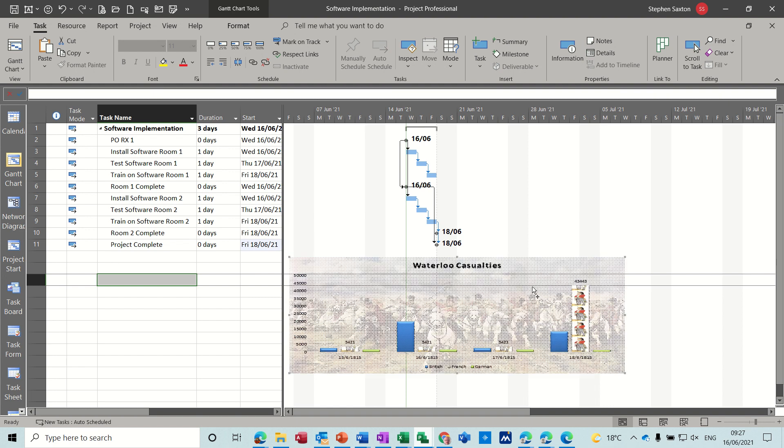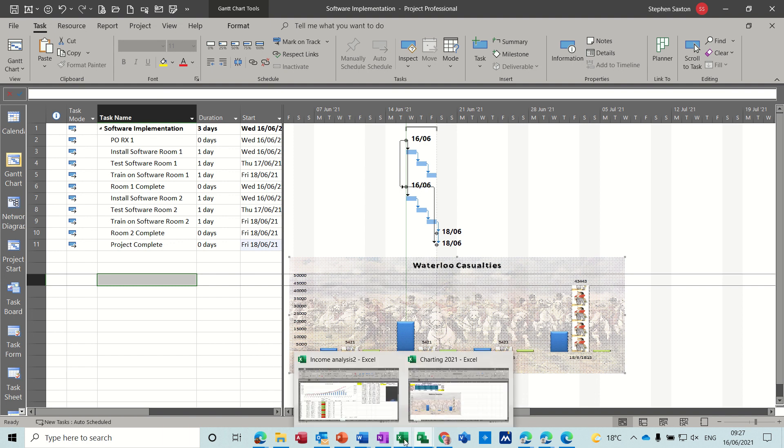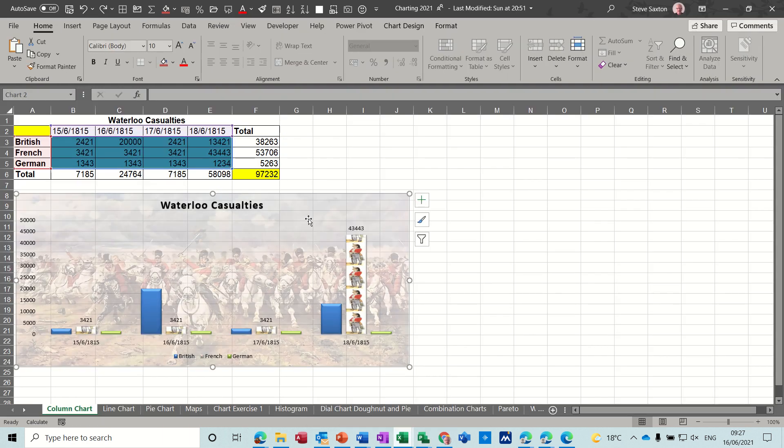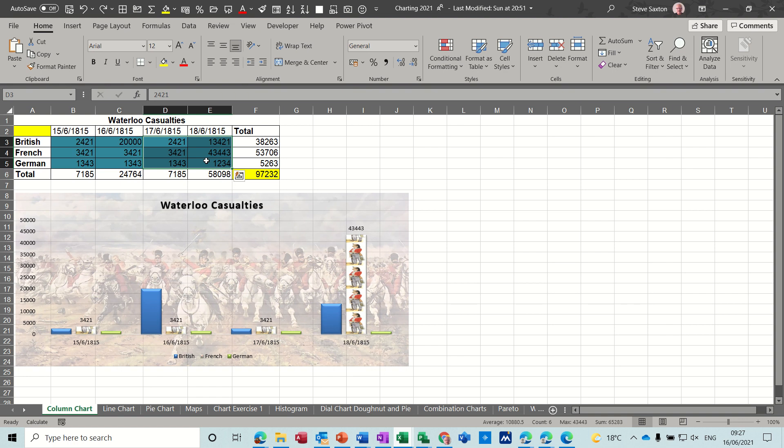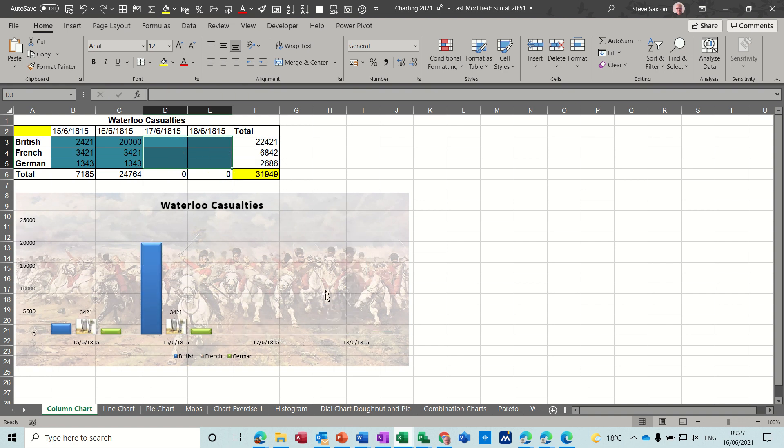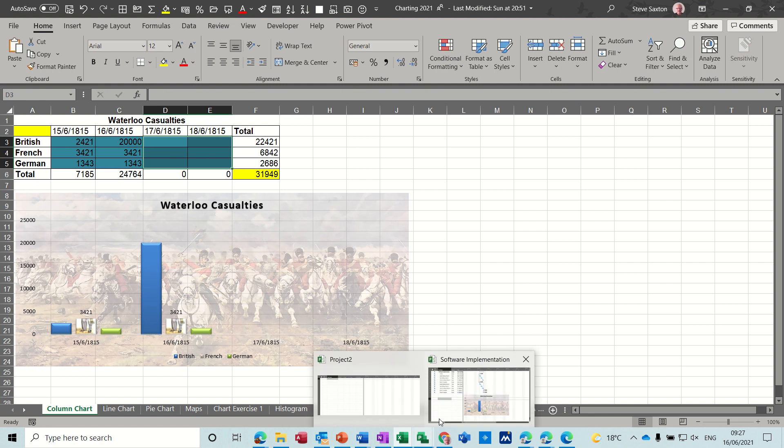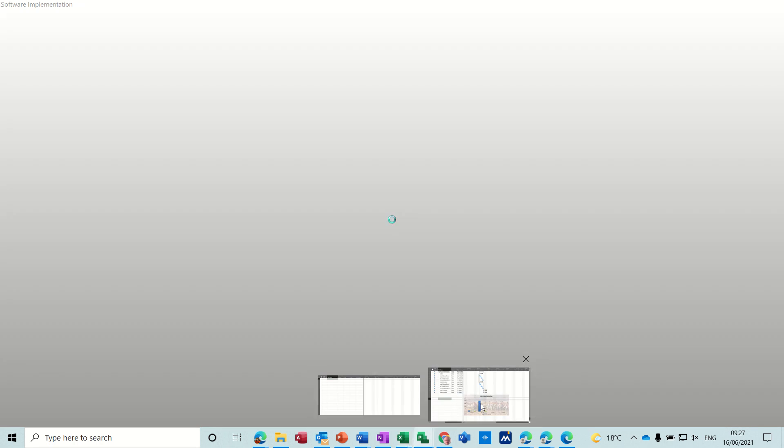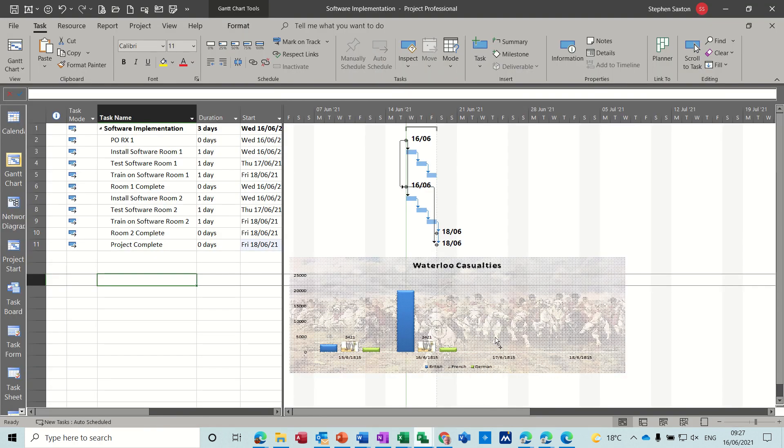So now that is a live link to the Excel file. So if I go back into that charting file and any of this data changes, so this is actually, say it was budget information using Excel to monitor your budgets and you just want that sitting in Project as well, you can see that that's updated. So whatever changes you make in Excel is automatically going to update in Project to give you a figure. Now you can create your own views and you might just want a view that has this on. I've done a video where I've just got a graph.